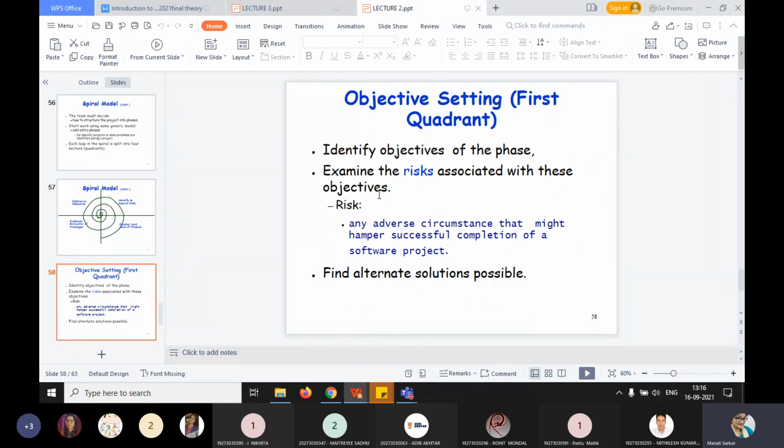This risk can be resolved by building a prototype of the data access subsystem and experimenting with the exact access rate. So basically the spiral model provides direct support for coping with risks by providing the scope to build a prototype at every phase of software development.